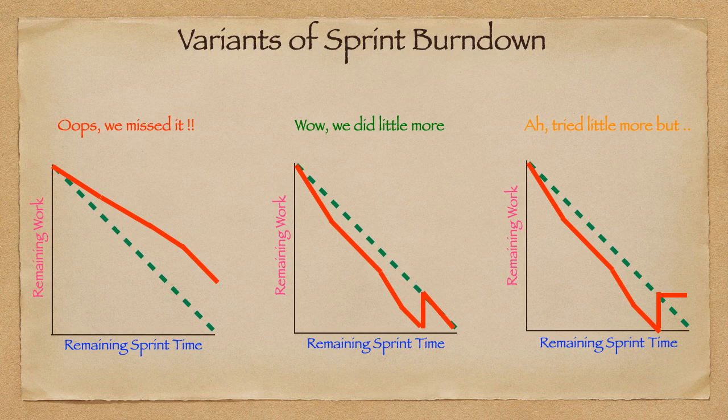So the way we are tracking here is based on the story points, because each item, depending upon the complexity, uncertainty and volume of work, may have a different size. So we are tracking based on the cumulative size, and we are updating the burn down as and when an item is completed. That means when it is meeting the definition of done. So it shows clear progress.